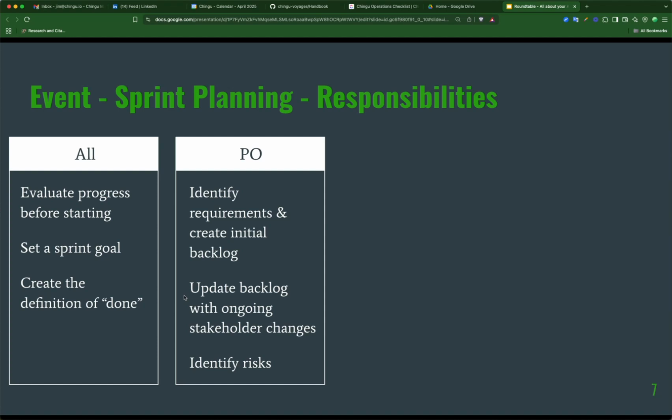Now, once you're in development, and again, we're going to take this from the strict Scrum definition. In the real world, as changes occur, as your stakeholders, as your end users come up with new features that they think they need, or as their priorities may change, as a product owner, you have to be on top of that to make sure that the backlog accurately represents or gets updated to represent what the user needs. Now, stakeholder means everyone involved in the project.